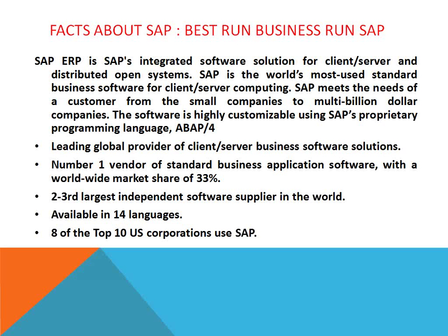Pretty much all were connected, and slowly and steadily we developed. First we implemented Great Britain and Continental Europe, and after that we rolled out this global footprint to America, then South America, and then the Asia Pacific region. In 4 years all the implementations were completed, a $100 million project, for a company of close to $8 billion.